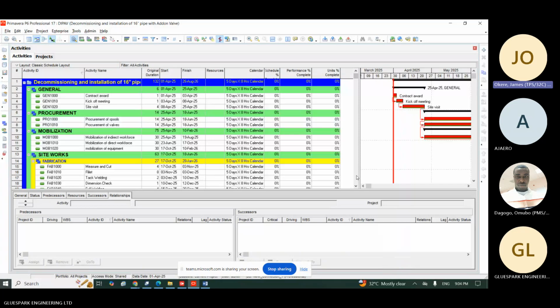Now, when the project is about to start, the HR, remember when we talked about the knowledge areas, the job of the HR is to recruit. But the HR needs to know who to recruit. So let me now tell you how the recruitment process starts. One is the project manager, because of his previous experience, can wake up and tell you, okay, for this project, I've done it before, and look at how we did it. We used 7 months, like this one now. We used 10 mechanical craft and 2 mechanical engineers. We used 3 fitters, the fitter guys, and we used 4 welders.